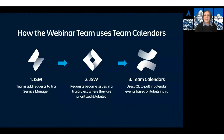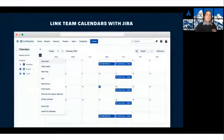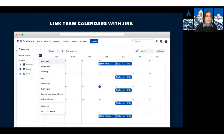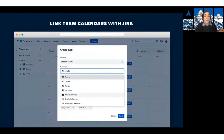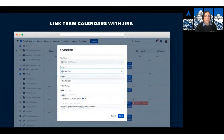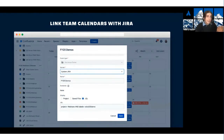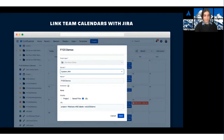Here's how you can set this up in Team Calendars. Once you have a Jira project all set up, you can go into the calendar events and add a new event that links into that project. Next, you choose from a variety of event types. In this case, we'll use Jira issue dates so that we can map the Jira requests directly to calendar events. And finally, you set the display to JQL and create whatever filter you'd like. In our case, we're pulling issues from the webinars project with a specific label around demos, but you could use any JQL query to pull in the relevant issues and turn those into a calendar of your choice.